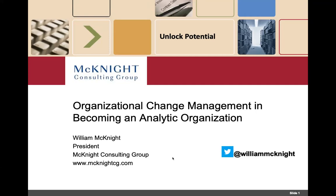Start with the users, branch out, branch up, branch down from there. It won't take long until you're at your limit in terms of how many you can actually deal with in this process. I kind of use 25 as a rule of thumb, but it can be whatever it needs to be for you — whatever you feel like you have the bandwidth to manage. You're going to find some stakeholders are going to be red and some are going to be green, and you hope that the green ones are going to spread the good word out to everybody else who is maybe a more minor stakeholder.